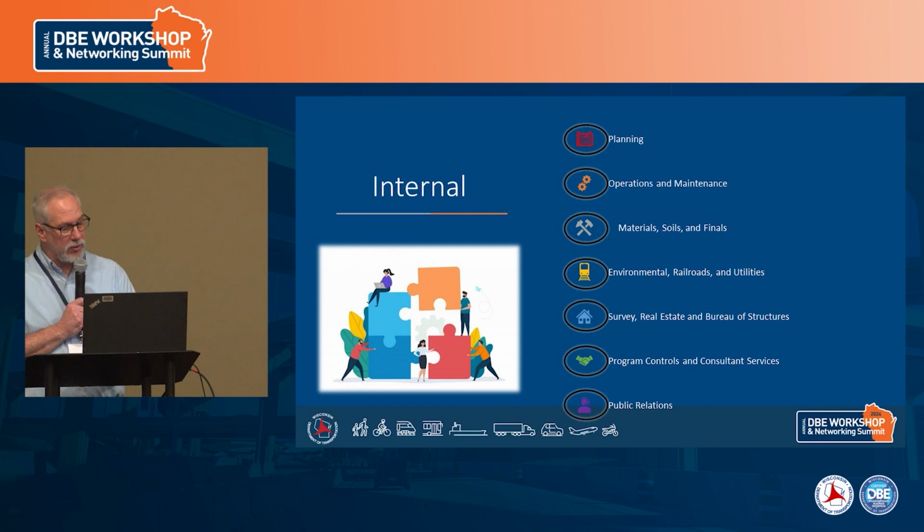And these milestones at 30, 60, and 90 are very important points to get concurrence on our plan sets as we move forward to minimize that risk of changes during construction.